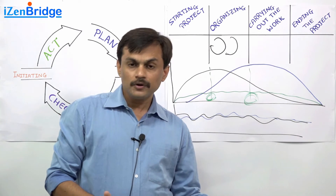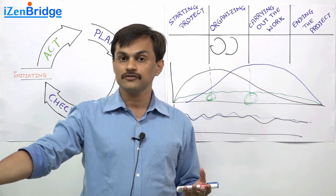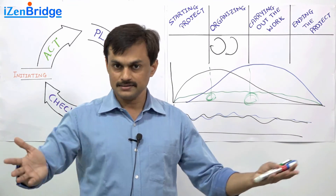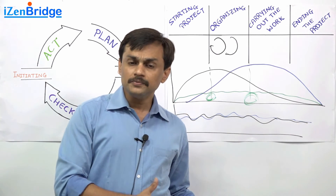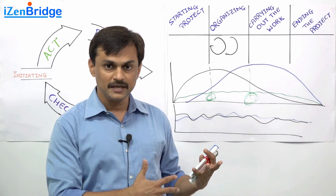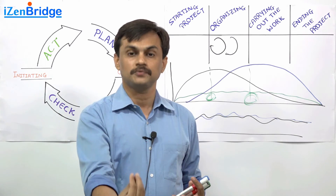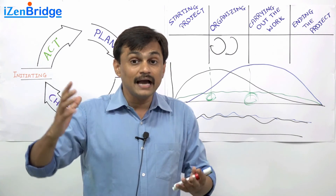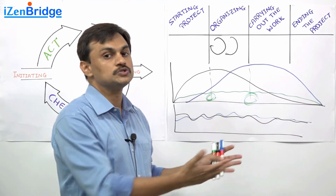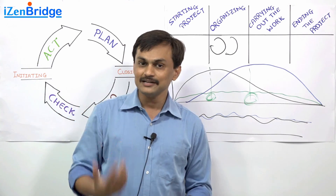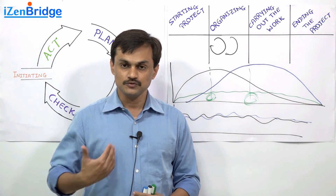Monitoring and Controlling process group processes have some common behaviors — they all look at the plan and data from execution and do variance analysis. That behavior is expected from all monitoring and controlling processes. Similarly, Executing process group processes will pick up information from the project management plan and apply that plan in the real world. Planning process group processes either initiate the first-time plan or revise the existing plan. Going forward, we will get into the details of each process, and the segregation of process groups will become very clear as we proceed.